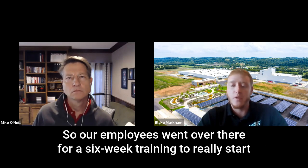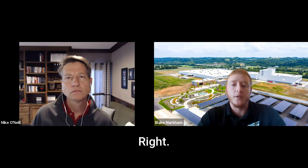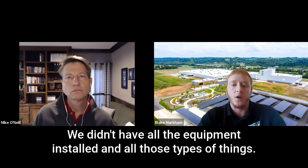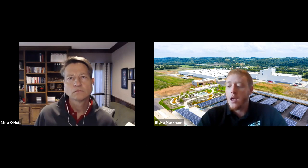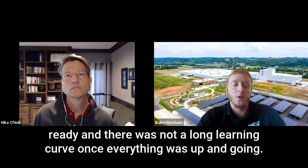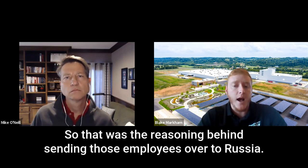So our employees went over there for 6 weeks of training to really start learning how to use the equipment, right? Because we were still in construction mode, we didn't have all the equipment installed. And we wanted to ensure that when the plant was ready, our employees were also ready, and there was not a long learning curve once everything was up and going. So that was the reasoning behind sending those employees over to Russia.